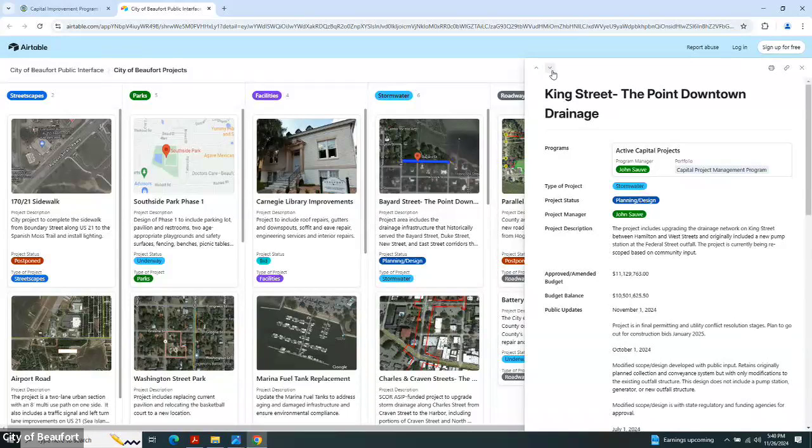The reason for the timelines on these is all of these stormwater projects in the downtown Point area are funded through passed down ARPA money. So it's ARPA funds that came from the federal government to the state, and then the state, either through the Rural Infrastructure Authority or the Office of Resiliency, passed that funding along to us as subrecipients. So it still has that December 2026 hard deadline for all the projects to be completed.